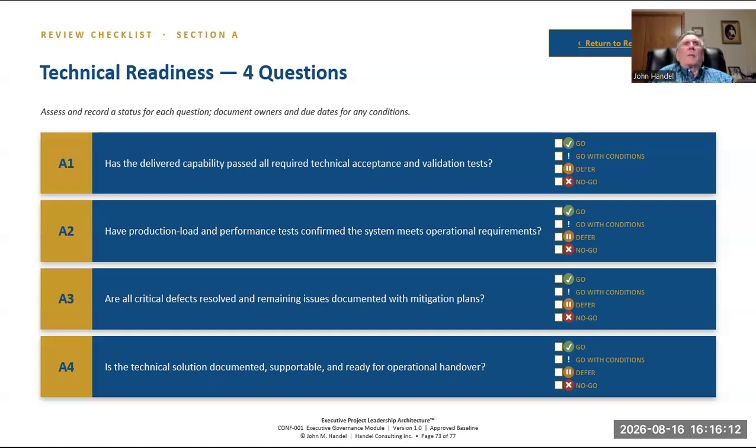You don't want to hold up a multi-million-dollar project because some minor thing is wrong. For example, if this screen was supposed to be light blue rather than dark blue in these text boxes, then functionally it works just fine. The color is wrong, and so you document on this particular screen the color should be dark blue and it's light blue. And you go on and you give a date when you can correct that particular attribute.